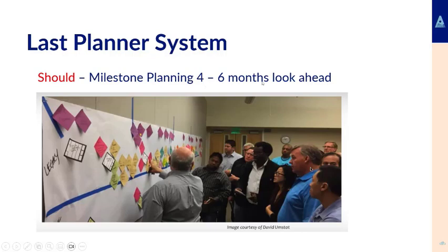So you're talking about making sure you have major subcontractors on board, that the contracts are agreed, what the milestones are, and whether there are environmental constraints that mean we can't work in this area. If there are, how do we plan around it? How do we phase the work to work within the planning and environmental constraints placed on the project, and also make sure that we have the right suppliers on board from a 4 to 6 months look ahead.